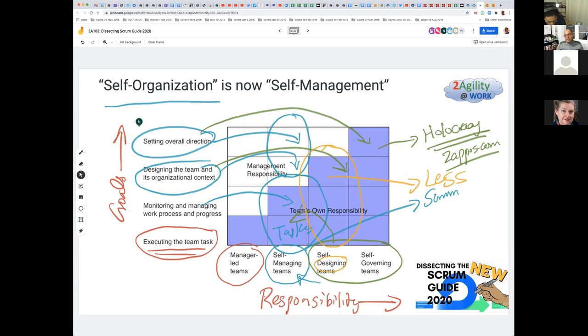Our learning from that was applied when we subsequently brought in some consultants to do Java work in an insurance transformation that I was involved with in Canada. We made sure we told the consultants that they could pitch in and were expected to do learning and any kind of work because they are paid for the time. So we put in the clause, and we had better engagement from the consultants because of that. If they had work within the boundary of their knowledge and skills, they would do that. But if they didn't, they would pitch in and do any work that was there, including learning on the job.